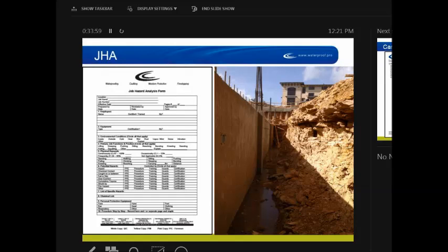Let's make sure we go to the job site, we survey those issues, and we fill out a job hazard analysis, because maybe we can start on a different section of that job site. Maybe it doesn't have to be in that FW location.